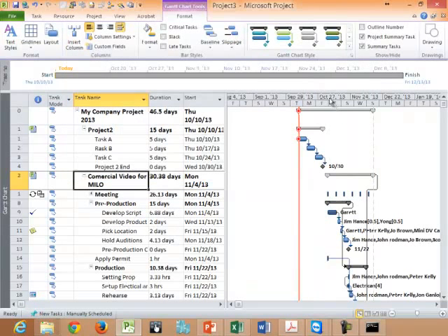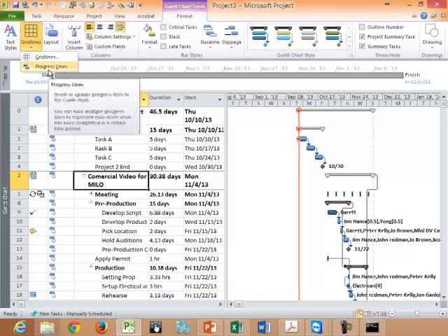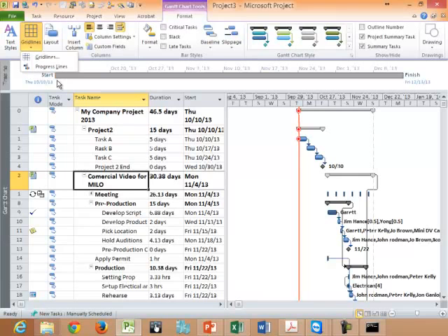Okay, dia akan bagi at this current date, okay, this task supposed to be done. Okay, dia akan bagi so on schedule. So kalau dia macam ada petanda, ada macam arrow panjang. Okay, when there is suddenly from here, this one in front, means this job is being done ahead. Okay, kalau you have ke belakang macam ni, this job is delayed.